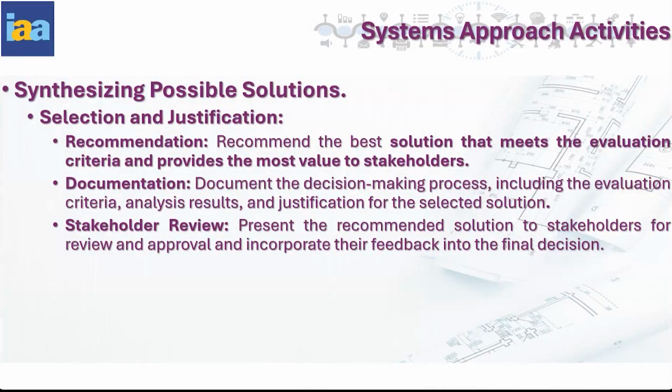While preparing the site, you may need some small space in the airport to keep some of the sensors or some of the servers. That also needs to be seen in the beginning itself. Otherwise, practically, you will find difficulty at the end stage. Oh, we have not found a space for keeping this equipment. We have not made provision for energizing this equipment. So this will also delay the whole project, and that may create a big loss for our organization.